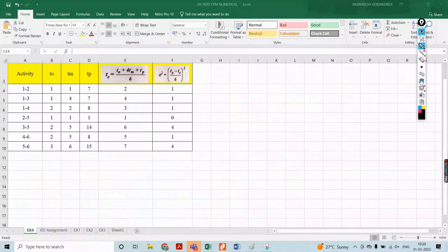Okay, once you did this, you have to make the evaluation for the first case: the time to complete that project work within 4 weeks. What is the effect? D equals, okay, this is the formula: the time required for that probability expectation, that is TS minus TE, divided by rho.